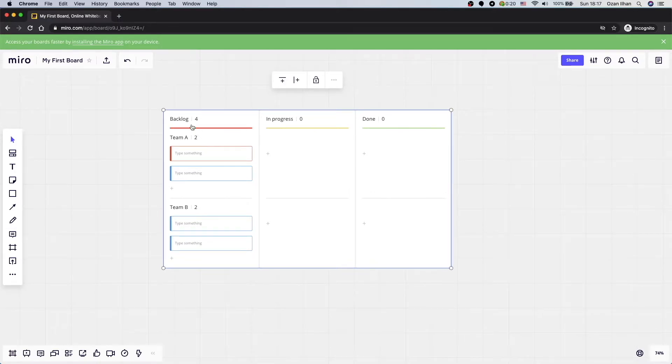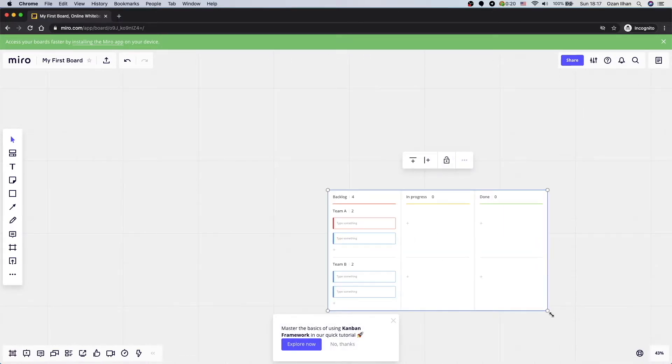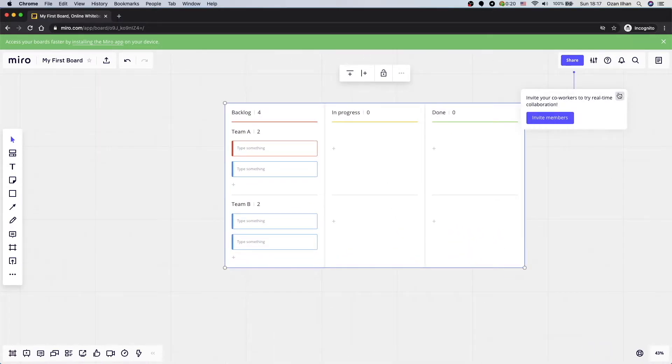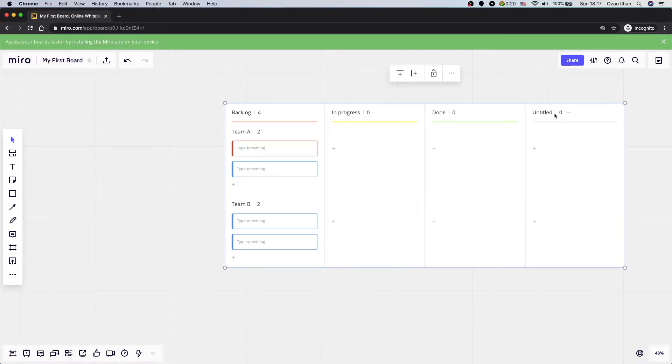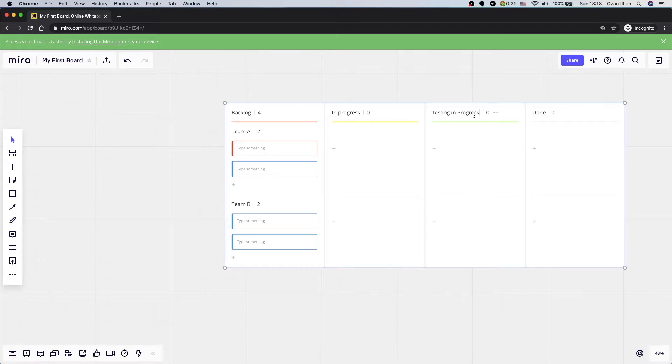Here, as we can see, we have our backlog items, which our team will work on. We have in progress and done. Basically, this is a very small development lifecycle. We can make it larger. And if you want, we can add more steps here. So click three dot, add column. Let's say this can be done. And I will change it to testing in progress. So now we have our backlog items, in progress items, testing in progress, which means when we will work, we will put the item here, and done, which means the testing is done.